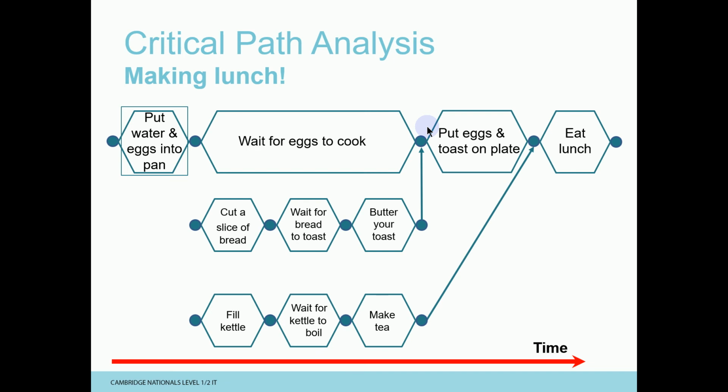So we're looking for the critical tasks within our project, the things that must be done, otherwise our project will get held up overall. It also identifies where we might have something called slack. That means that if one task is quite short, it may have people and resources allocated to it that are doing nothing, and they could be busy doing another task in order for the project to finish sooner. So the critical path is designed to find slack in our projects and therefore better resource our projects to make them finish quicker.